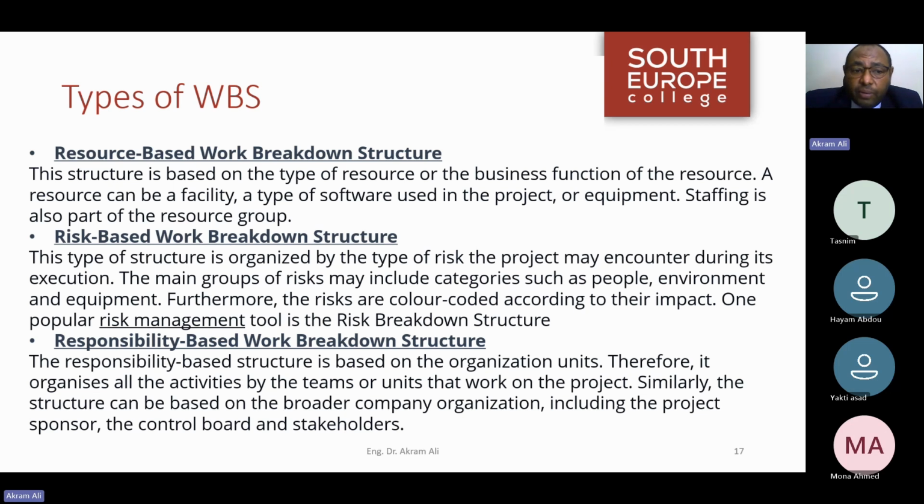So I need to have a clear organizational breakdown structure and a work breakdown structure, and where, for example, my types of project are resource sensitive, so I need to assign tasks based on the resource-based work breakdown structure rather than assign resources to the tasks according to a work breakdown structure.